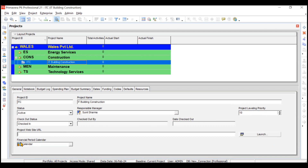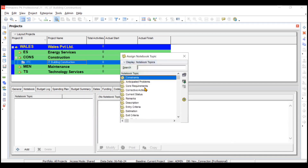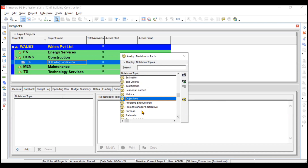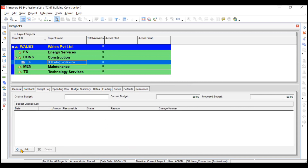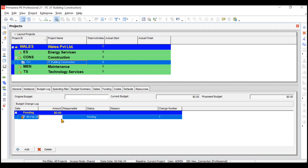You can also add a project website and launch it from here, or choose the financial period calendar. The Notebook tab lets you add notes like remarks, project objectives, or problems encountered for reference in other projects. The Budget Log lets you track changes in budget: original budget, current budget, proposed budget. For example, if the budget for overheads or staff salary has decreased due to loss of profits, you can record those changes here.